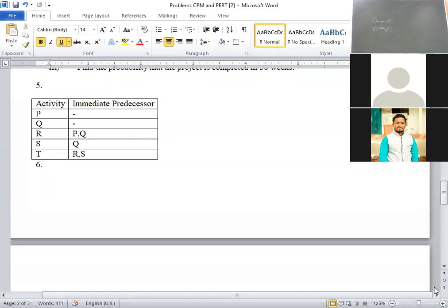Why we are using dummy activity? Correct? Now we will get doubt. If it is represented by a dotted line, the time duration is 0. Why we are using dummy activity? Okay? Here, what is the meaning of project management? Project management is used for controlling, staffing, coordinating various events. Correct? For that purpose, we use dummy activity. Dummy activity forms a connecting link for control purpose or for maintaining the uniqueness of activity. A dummy activity is used to maintain the network logic and to avoid ambiguity.